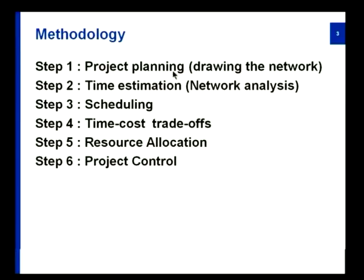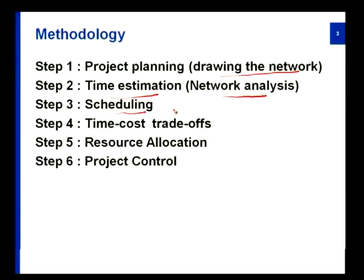Any project requires a good amount of planning. I should understand what the different set of activities are, what each module involves, and when it will be complete — and from there I will calculate the overall time period. For that project planning, we will draw a network diagram initially. Then from that network we will go for time estimation, which we call a network analysis diagram, from where we will calculate the overall schedule. So this scheduling gives me an appropriate time within which I can complete the entire work, and further I can go with time-cost trade-off, resource allocation, and project control.